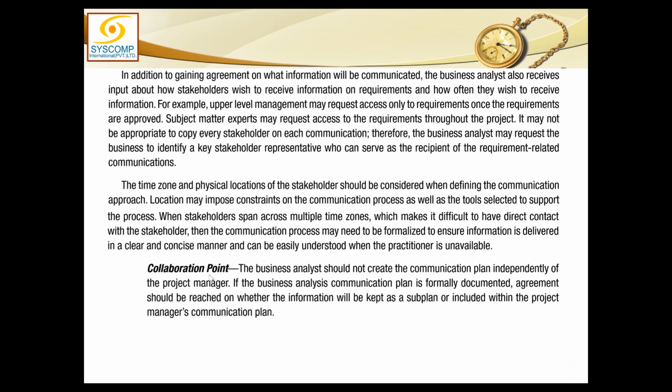So the collaboration point here is the business analyst should not create the communication plan independently of the project manager. If the business analysis communication plan is formally documented, agreement should be reached on whether the information will be kept as a sub-plan or included within the project manager's communication plan. So they have to mutually agree on that.